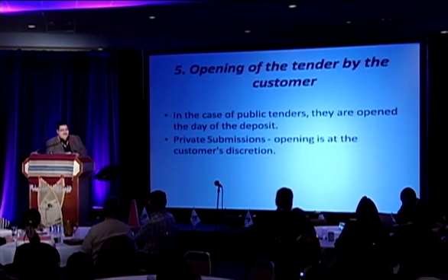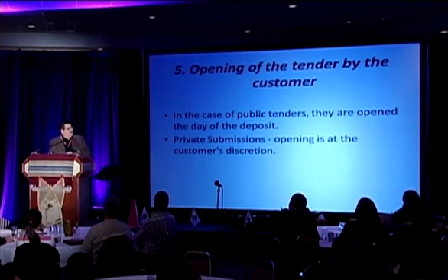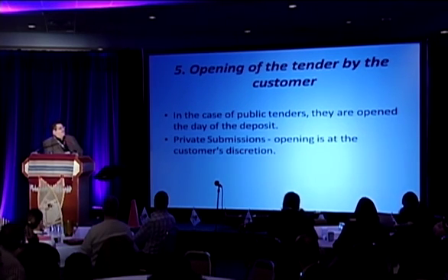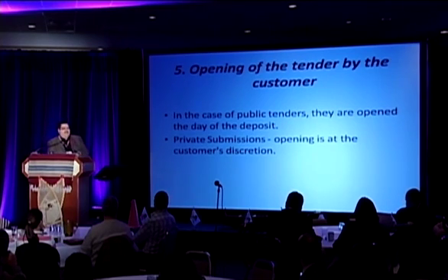In the case, in Quebec anyways, in the case of a public tender, they are open the day of the deposit, and normally there are witnesses there to say, okay, yeah, it's this person. And then they will go through the process of validating everything that's in your bid. Did you include all the required documents and whatever criteria they had? And if you are in conformity, then you're the successful bidder and you obtain the contract.